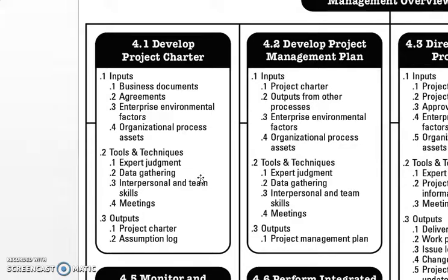The outputs are naturally the project charter, then the assumptions log. When you prepare a project charter, there have to be some assumptions because some of the things may not be certain. Those things you will assume. Things should move as per your assumption; only then will you be able to complete that work. So you are making an assumption log. This is about develop project charter.